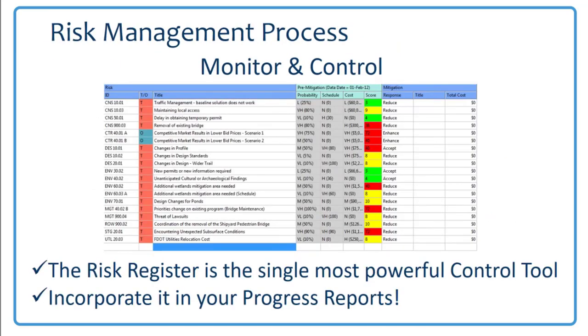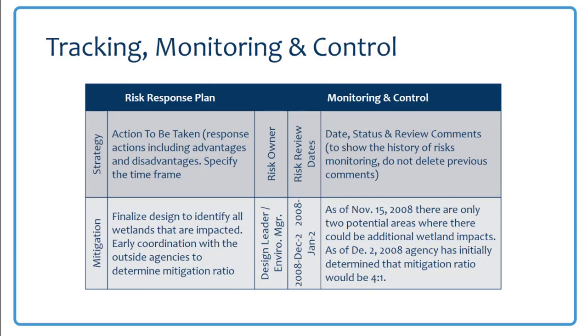Throughout the process, you'll be managing your risks using the risk register. And again, it's the heart of this process, and that's a good one-stop location to get a snapshot of all the risks on the project. And you can incorporate it with your progress reports. Again, in risk response tracking and monitoring and control, you can document in your risk register things that happen along the way.